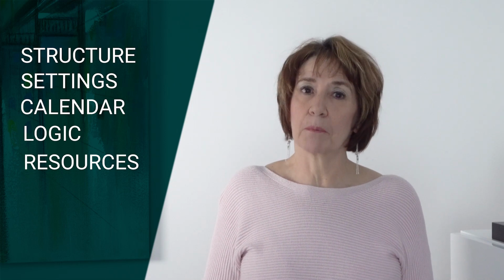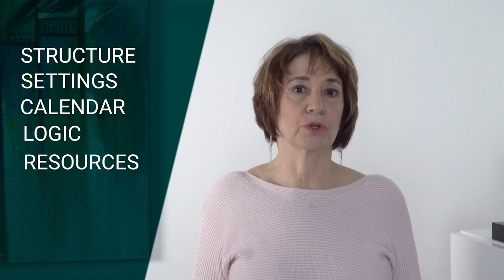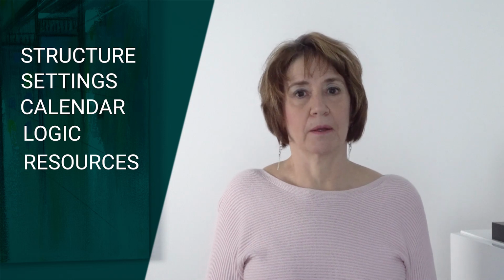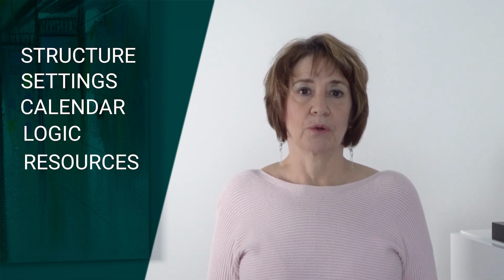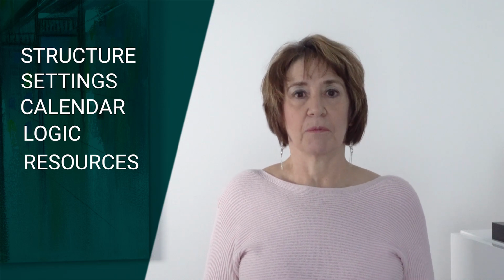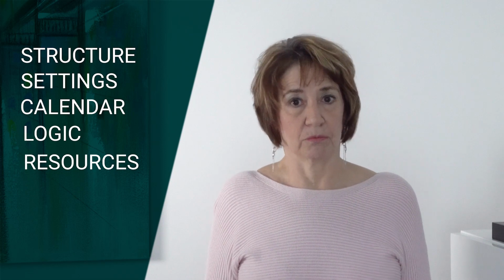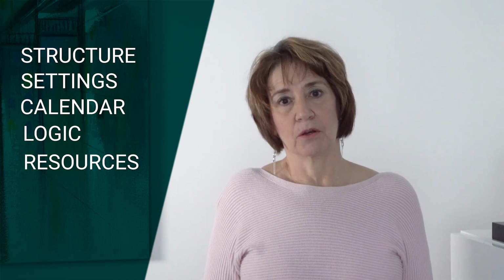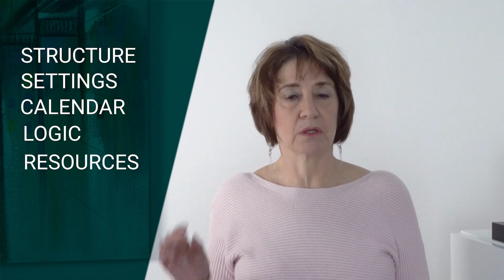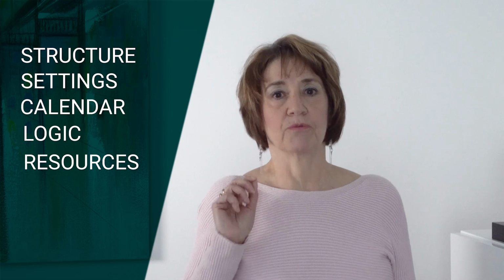I think there could end up being about 9 different ways that this same resource could be in your plan if you put it straight on the task. So you're best off setting all your resources up in your project sheet or in your dictionary, whatever they call it, and then you get into your activity or task and you select the name from the resource sheet.